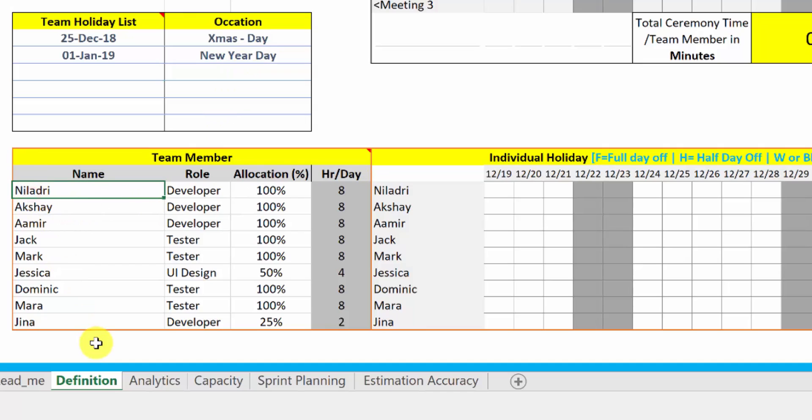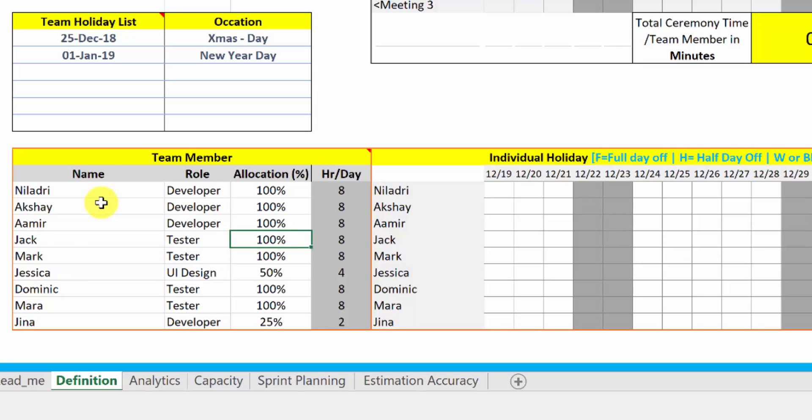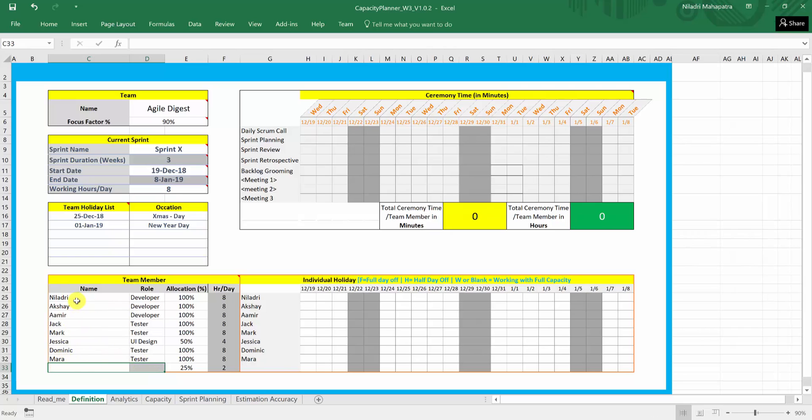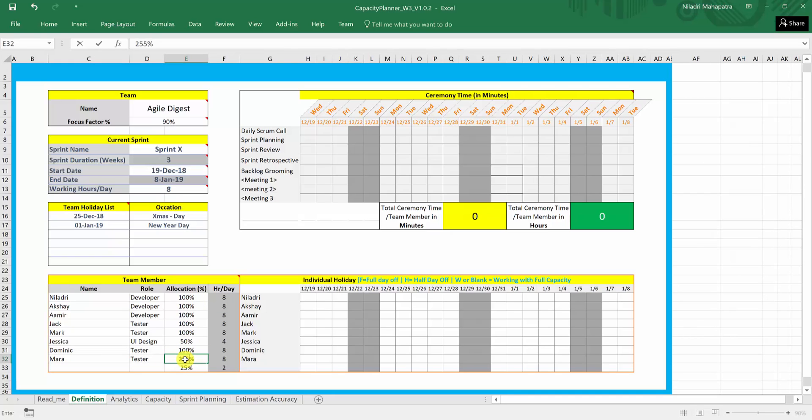Now you can define your team member. These are all activities you need to do it for the one-time activities when you are doing it for the first sprint and next sprint onward, you just need to change these dates over here and this section I will talk about later. Now you can define all your team members one by one and their role. If you think you have more than 90 members, then you can drop me a mail for a change. If you have less than 90 members, you can actually delete it from here. So for this example, I am just, let's assume we have an eight member team and I am deleting this one. So now we have only eight members and these are the members. You can change the name and the role, anything you want to add and their allocation to their project. So let's assume this person have 25 percent for an example.